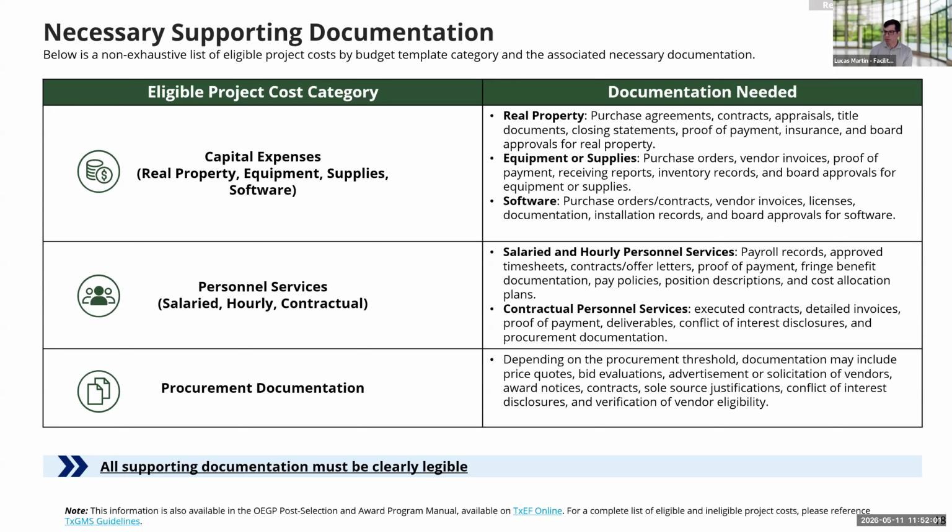I won't go through line by line, but I think you get the gist in that the intention is for you all to provide a lot of supporting documentation, and mostly noting, at least in the disbursement request process, all of it needs to be paid already for us to be able to reimburse those costs that have been incurred by you all.